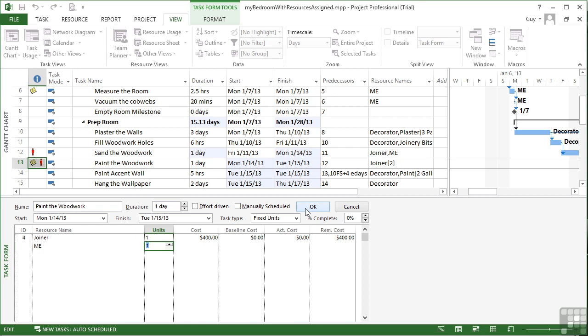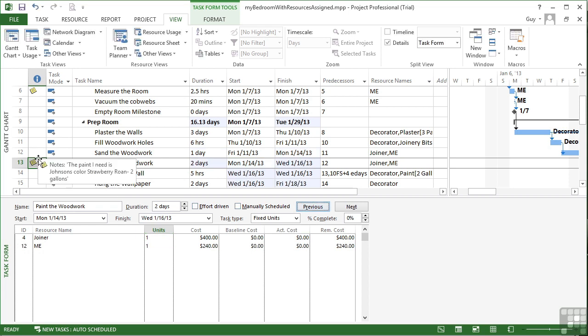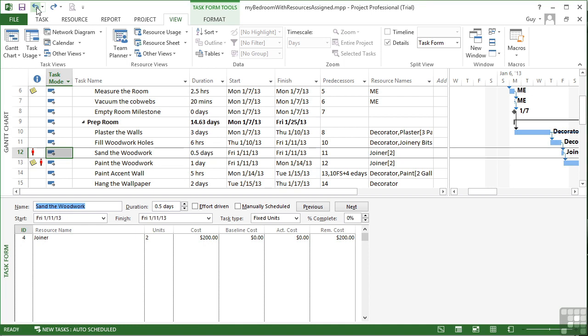Now, I do have to click OK here, whereas in the floaty dialog box, it just happens automatically, which is quite good because it means I can make sure that the number of units is the same before and after the OK button. That way, I'm not going to adjust the duration accidentally. And OK. And we see the two little red people disappear because I've effectively assigned the overallocation to somebody else. If I undo, they'll come back.